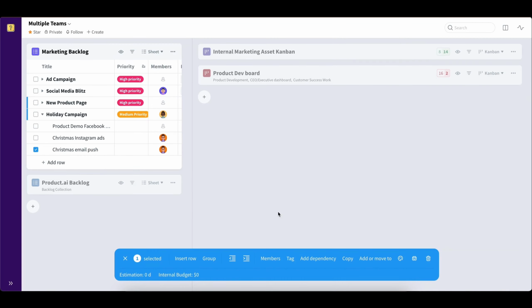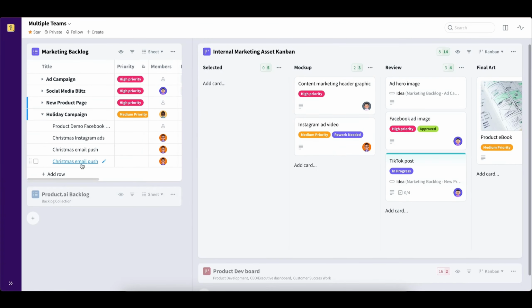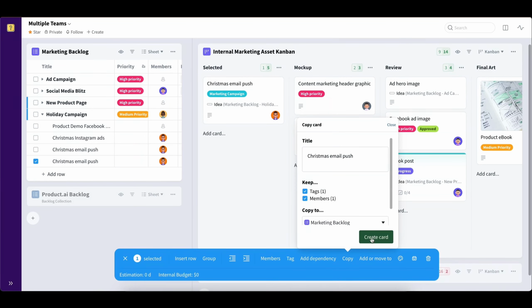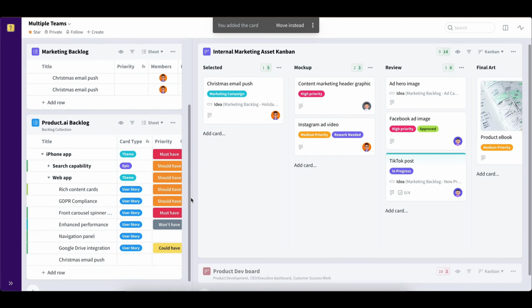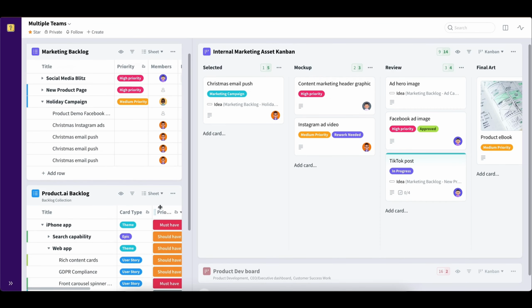we often see that the card has been copied with all the information and then added to a board like this. And then it might be copied again and added to another team board. Now, this is a wrong way to work, as all of these cards are different, and then it's harder to find which card is in which location.